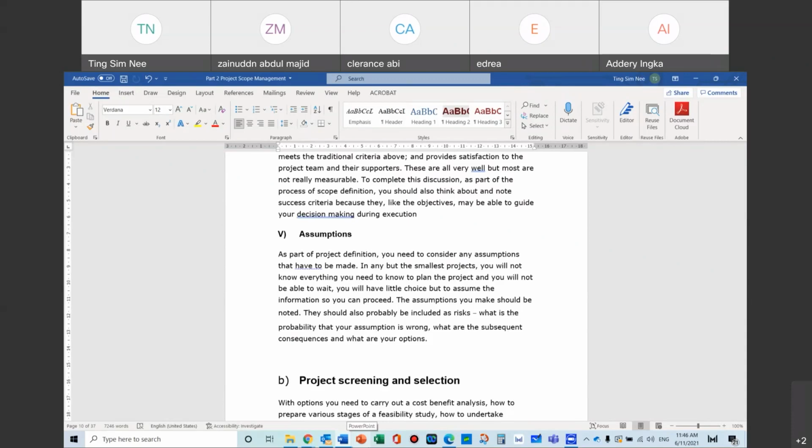You go to site and carry out some bore log, some topo, send in some surveyor to do some checking on the site, topography, the location, everything. So you've done some technical studies, you've done some testings, and then you look into different authorities, whether this area belongs to BOMBA, JKR, DID, councils, Palawan councils, or MBKS councils. So you understood the authority requirements, and when you have done all this, you can do your feasibility studies.